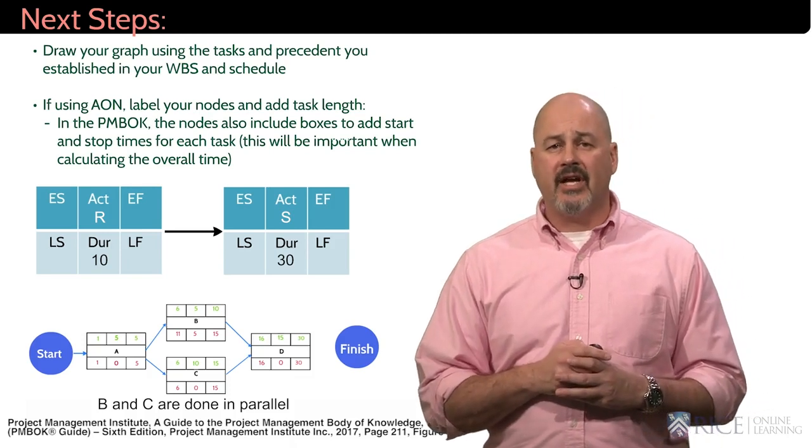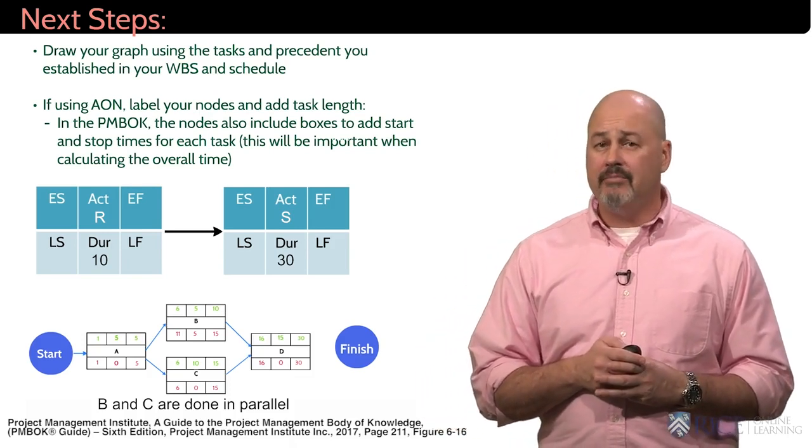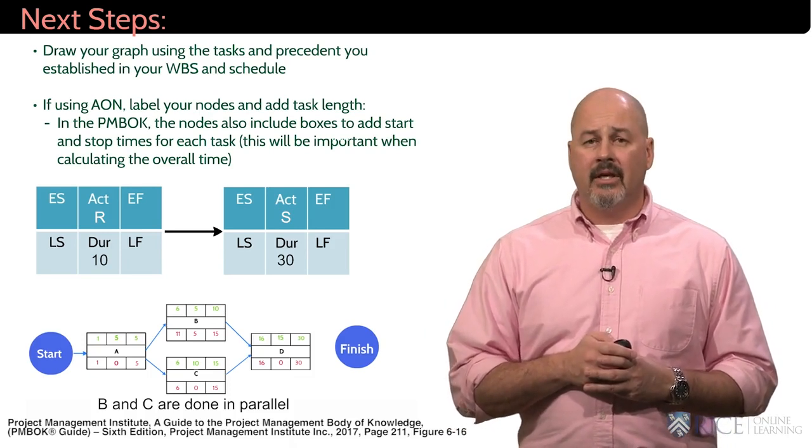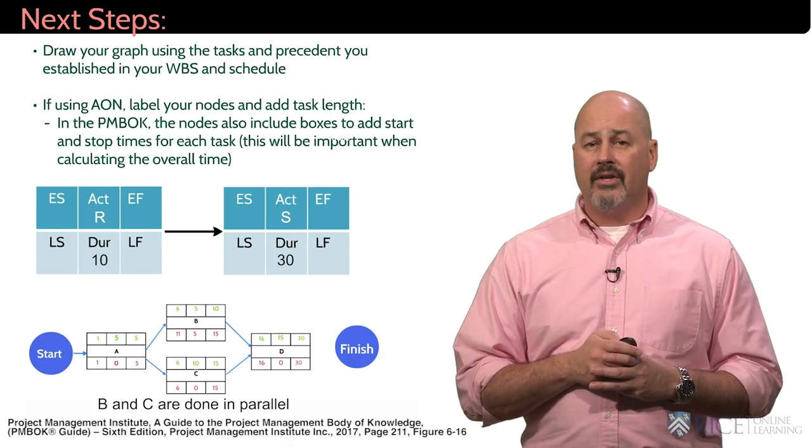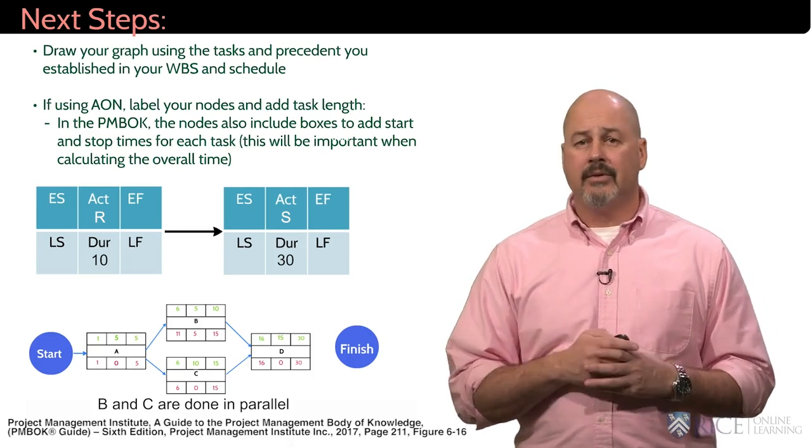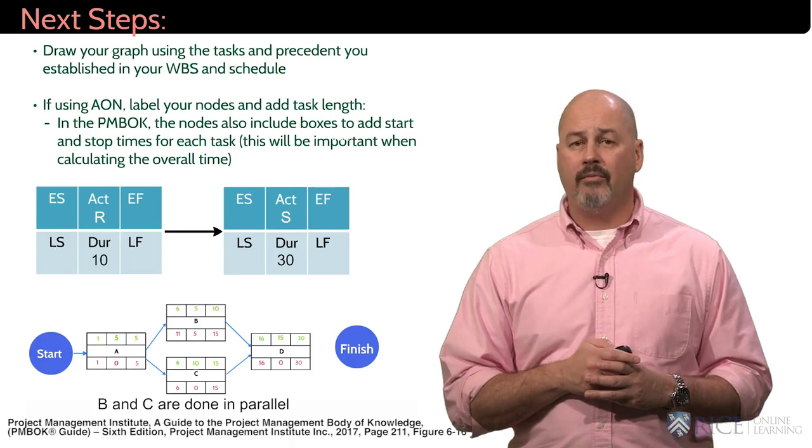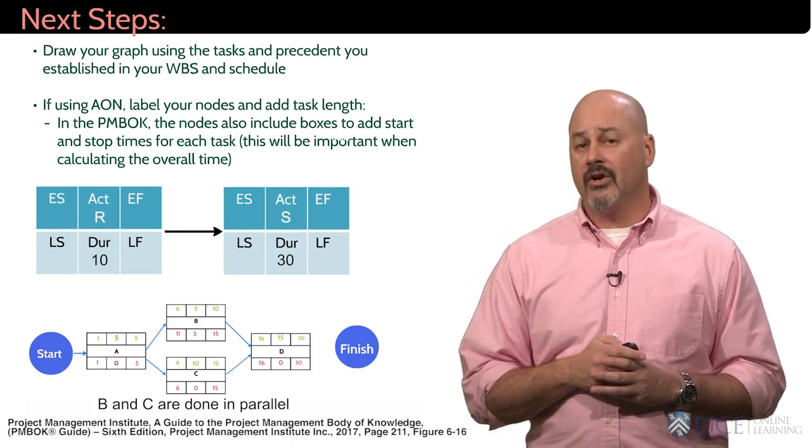As you can see in this diagram, A must precede B, and B can only start after A is completed. If you have tasks that can be done in parallel, you draw the diagram like our second example, where B and C do not depend on each other, but both must be completed before D can be started.